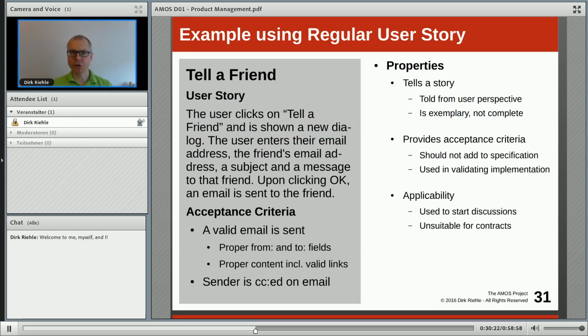User stories don't have to be short or simple. They can be more complex, more like actually telling a story. And so you could describe the required functionality like this, telling a story. And don't forget your acceptance criteria, where you check up on various aspects orthogonal to how you told the story, that allow a product owner and a software developer to use them as acceptance tests, if you will, to look at some implementation to determine whether it was done properly.